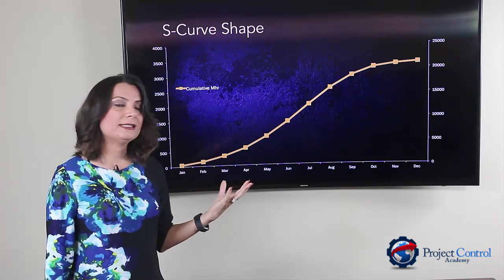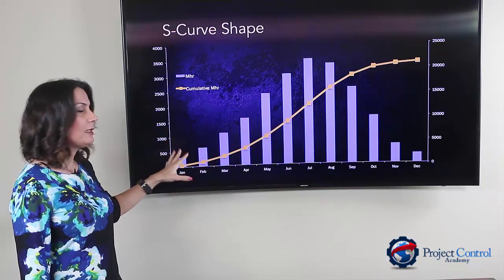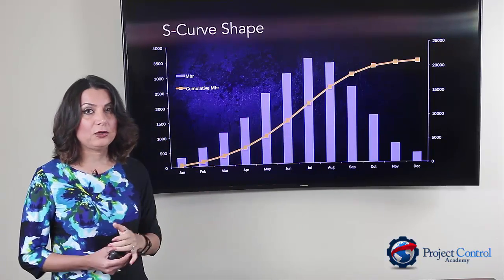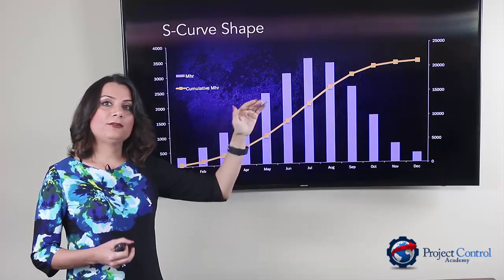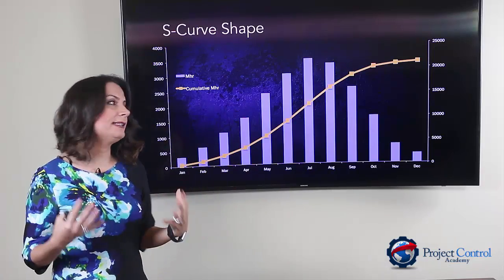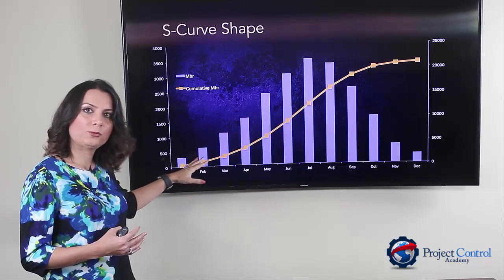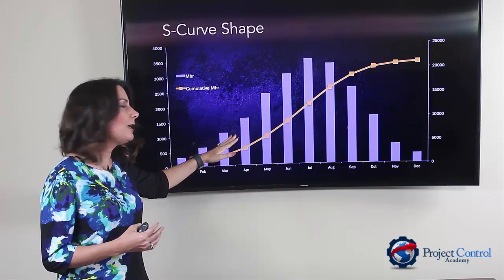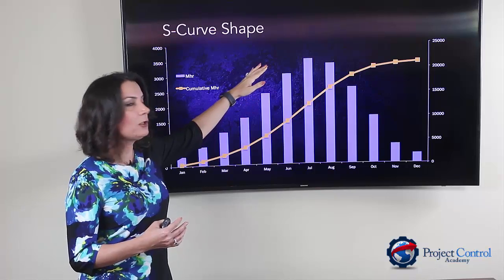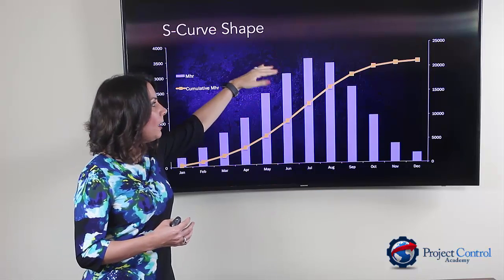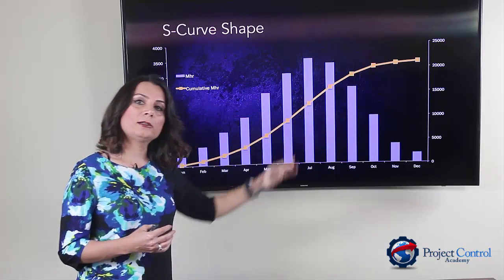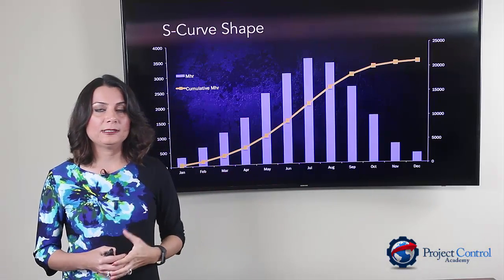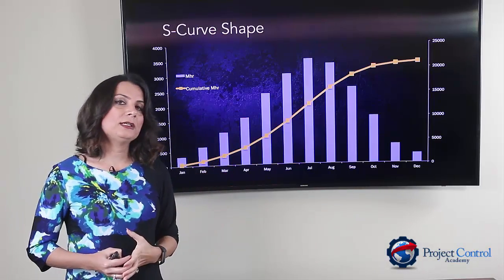The reason is — if I plot the incremental data in a project, you can understand why cumulative data shows like an S-curve. In most projects you start very slowly, then you ramp up during project execution, and then you ramp down as you close out the project and deliver most of the deliverables.